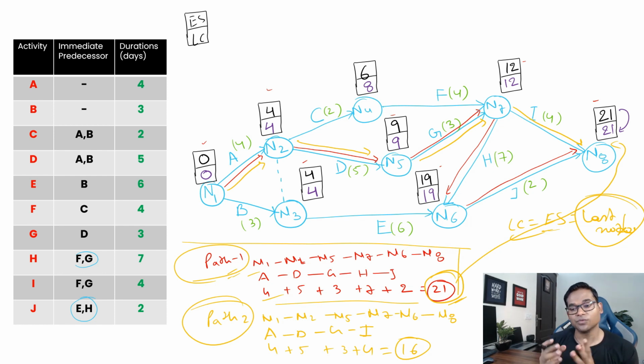And suppose you don't have a fixed duration and there is uncertainty in the duration, you can utilize the PERT technique to calculate the duration, then utilize your variability factors there, and you can calculate the probability of completion of a project in a given duration.